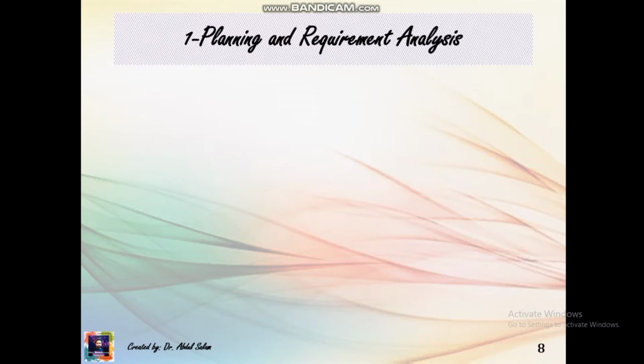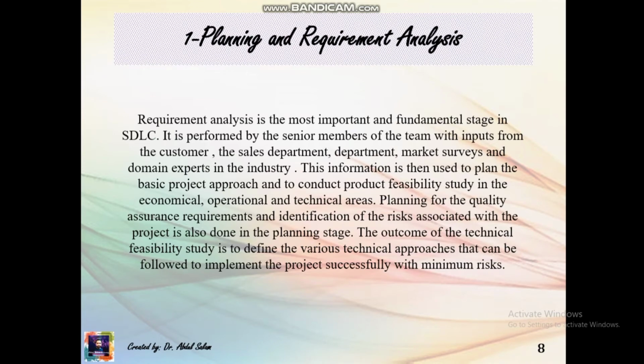Planning and requirement analysis. Basically, requirement analysis is the most important and fundamental stage in this model. It is performed by the senior members of the team with inputs from the customer, the sales department, market surveys and domain experts in the industry. This information is then used to plan the basic project approach and to conduct product feasibility study in the economical, operational and technical areas.